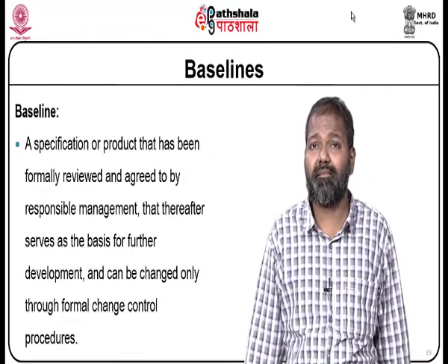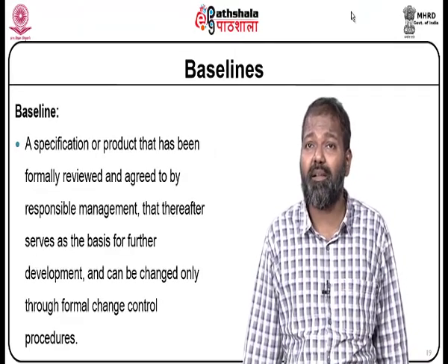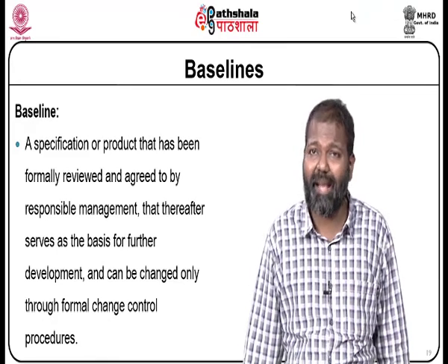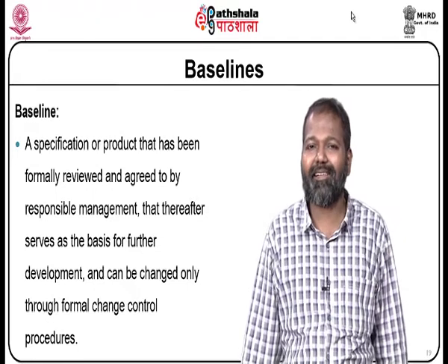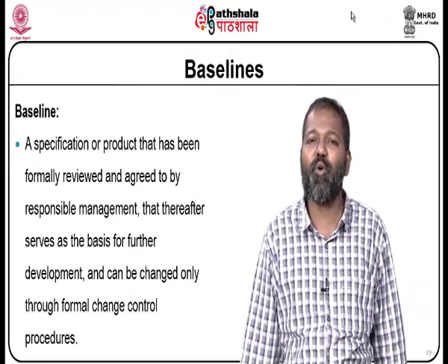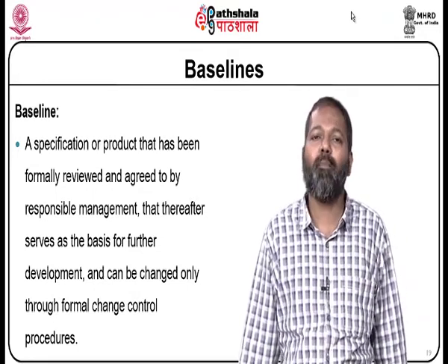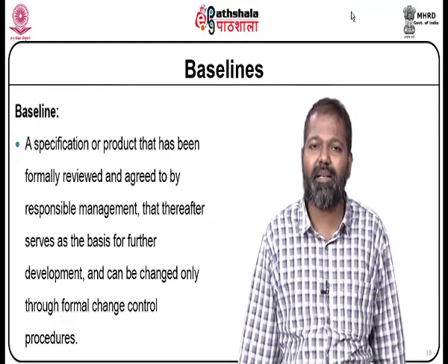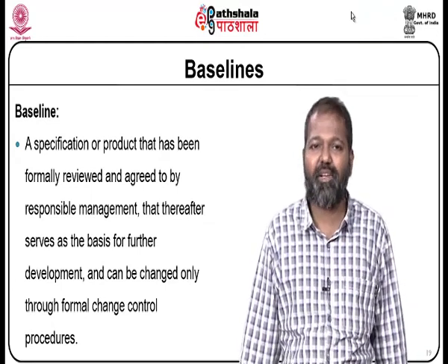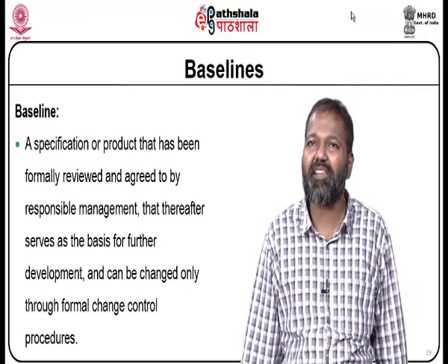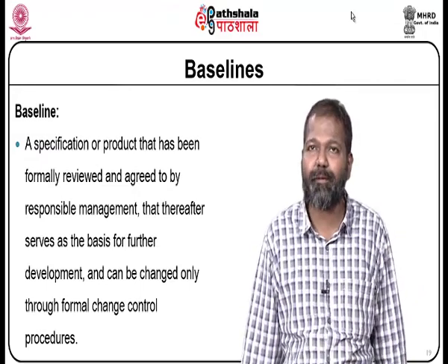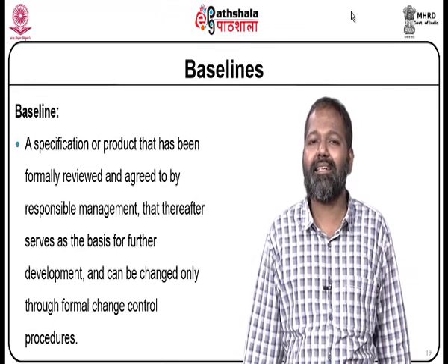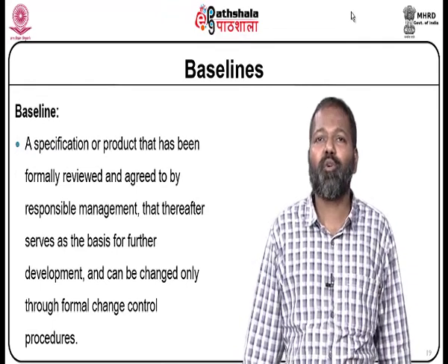Baselines, which is one important concept in software configuration management. A specification or product that has been formally reviewed and agreed to by responsible management, that thereafter serves as the basis for further development and can be changed only through formal change control procedures.